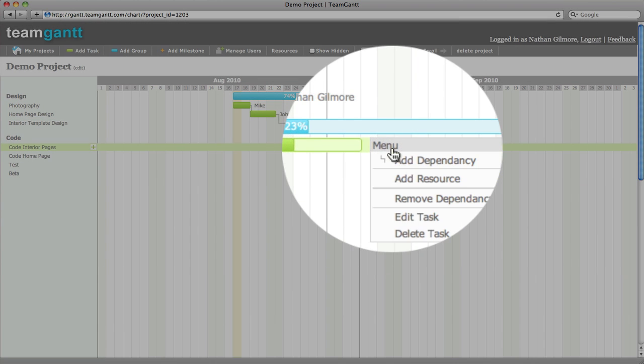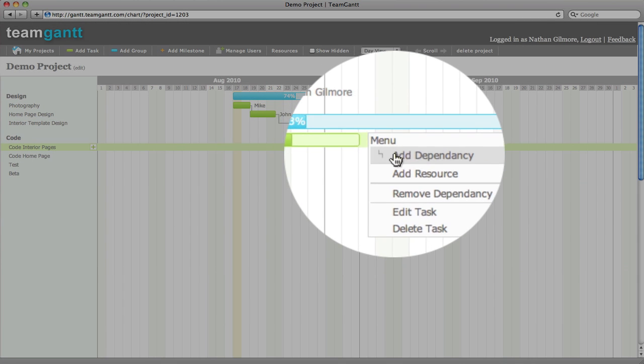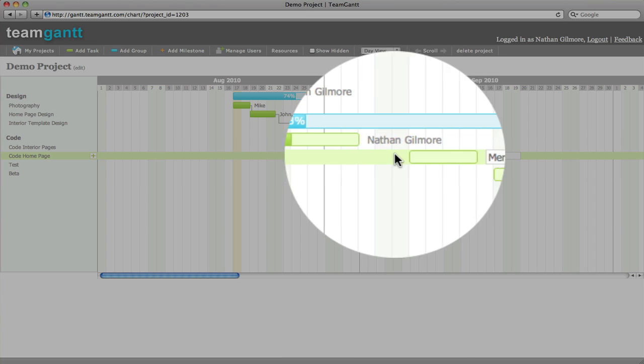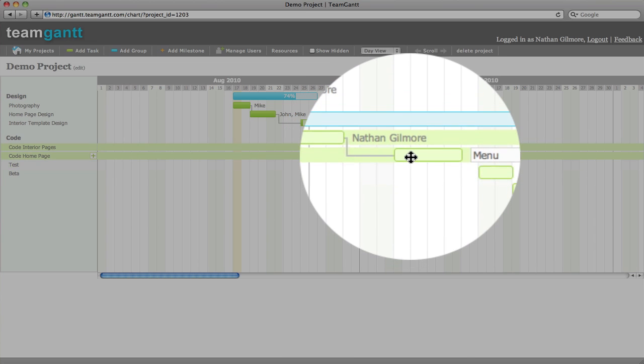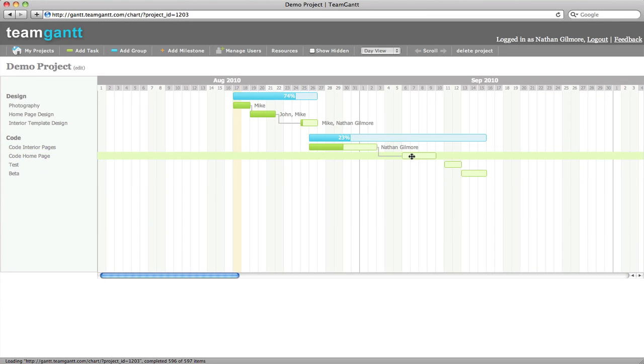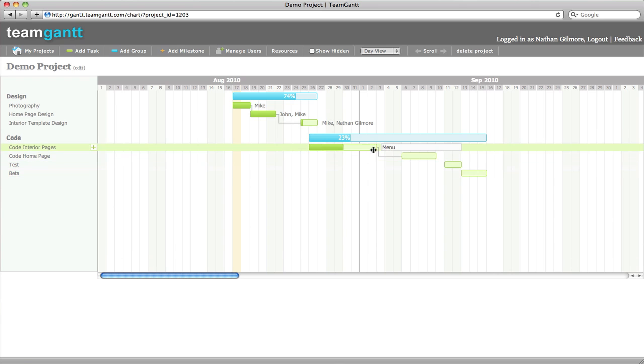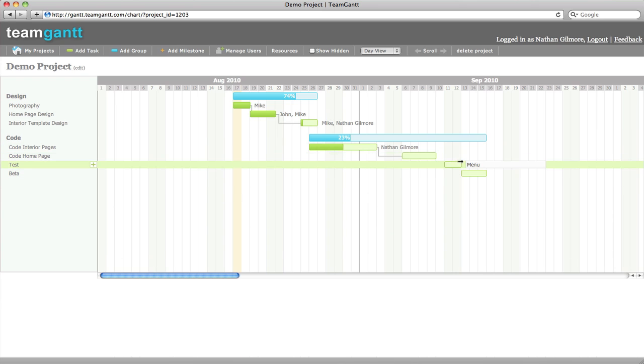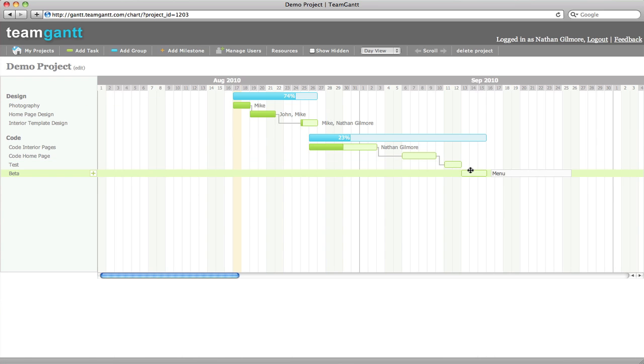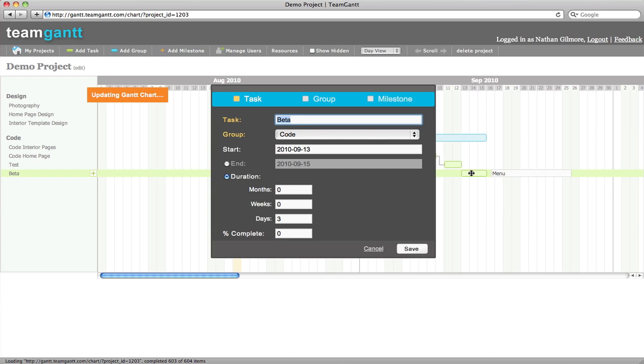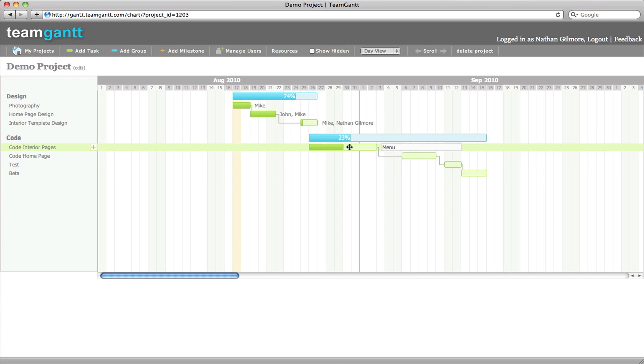To add a dependency, just click menu, add dependency, and select a task that is dependent upon the task you originally selected. You can see that these two tasks are now linked. We'll add a few more. See, we just linked all these tasks together. It's very simple.